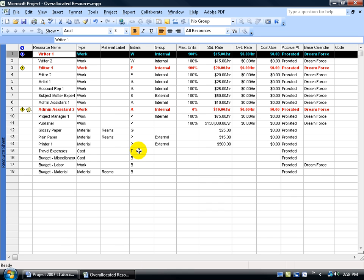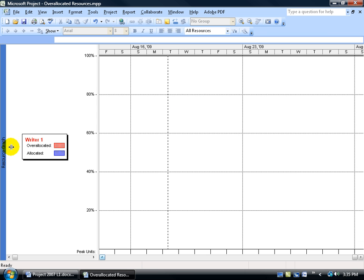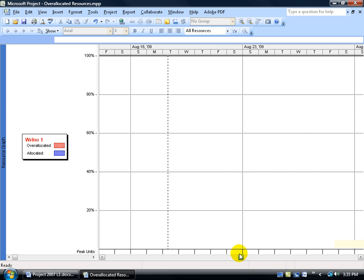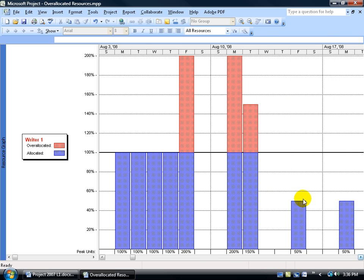Another place you can go — right-click on the collapse view bar and go to Resource Graph. In the Resource Graph view, it's divided into two panes. In the left pane, we have a list of all resources to scroll through. On the right, it shows the days resources are assigned in a column chart format. If you don't see them in the right pane, check the timeline year — mine showed 2009 but my project is in 2008. Drag the slider all the way to the left to get back to 2008. If a resource name is in red and bold, that resource is over-allocated.